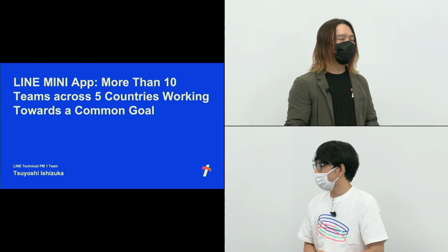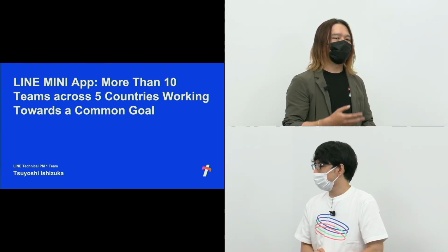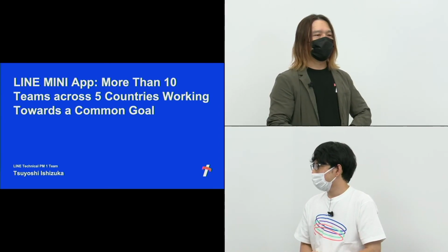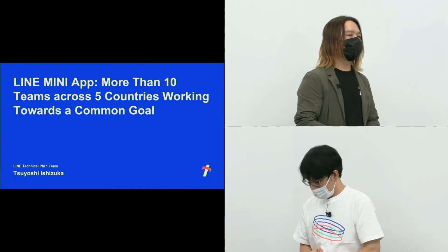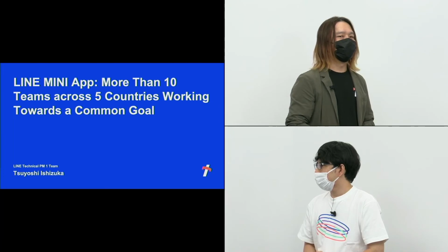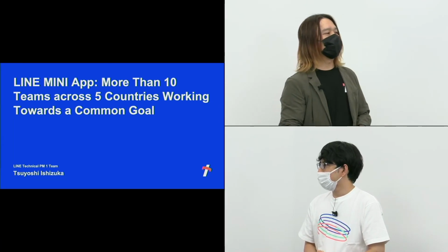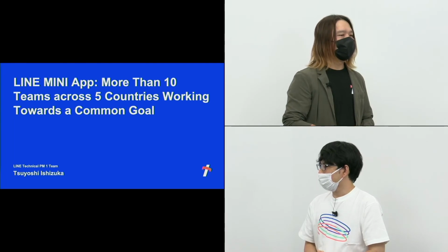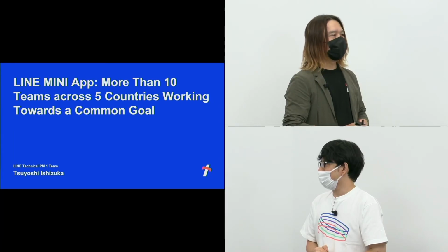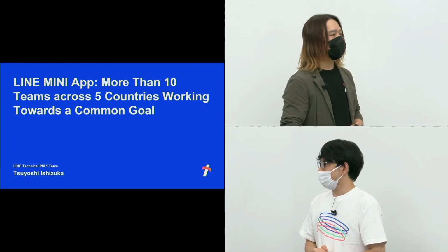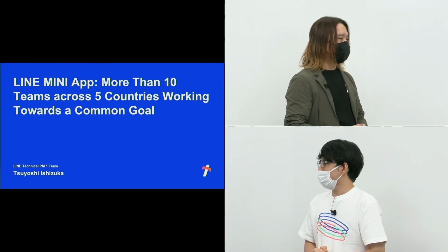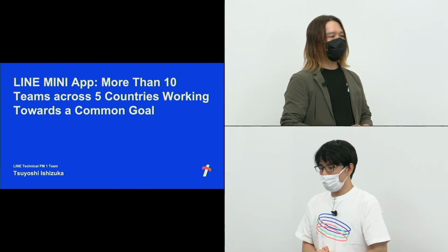Getting information from multiple tickets and displaying it on one single screen is convenient, but how to filter the tickets? It is possible to use the Jira filter, so create the necessary query and do the proper filtering. That is a bit difficult. If all the tickets are displayed, it becomes chaotic. So you have to filter the tickets, identify the important ones, and present them on the dashboard.